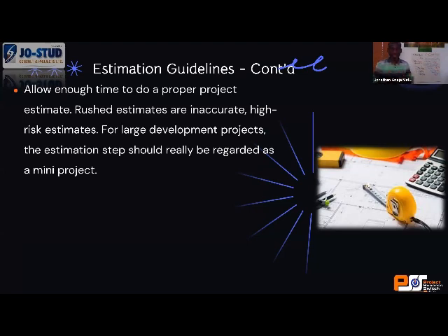But I would always advise people, take out time and do a bottom-up. If you don't have the requisite experience to do a bottom-up, hire a quantity surveyor. It is their work to do what they call the BOQ, bills of quantity. If the work is too complex for the quantity surveyor, I always advise clients, hire an engineer to give you what we call a BEME.